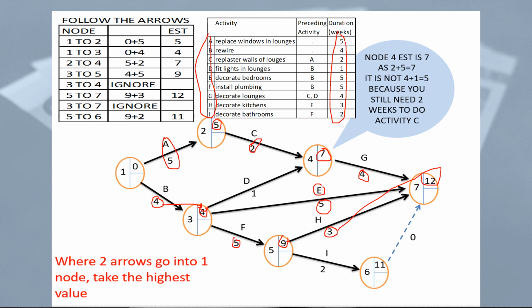In the same way, you can take your work breakdown structure and produce a table of all the different activities that need to take place, and label them A, B, C, D, E, F, G, H, and I. And then you can put the duration of time, because remember, it's a duration of time between 1 month and 3 months. So you can put the duration of time and then plot it out on your critical path analysis. So, okay, let's have a look.